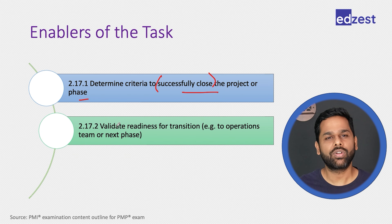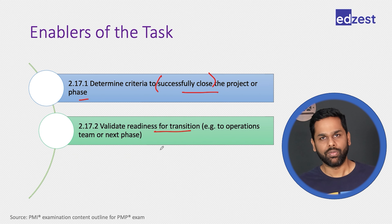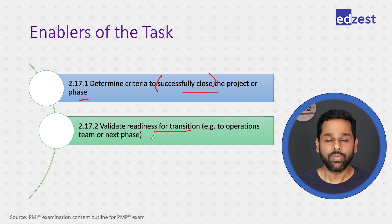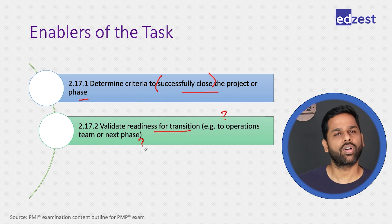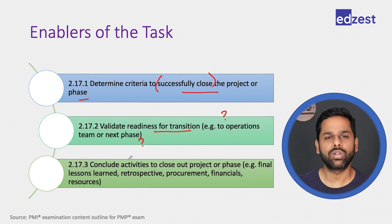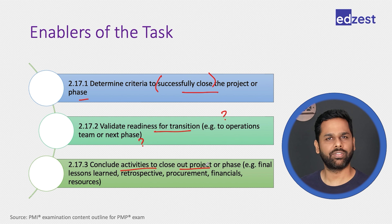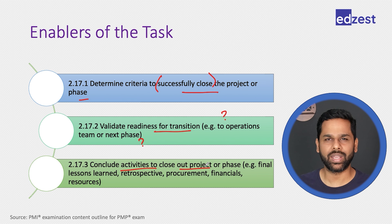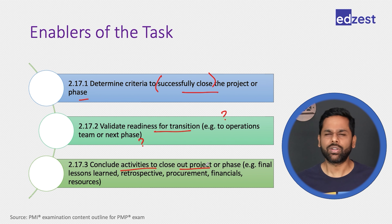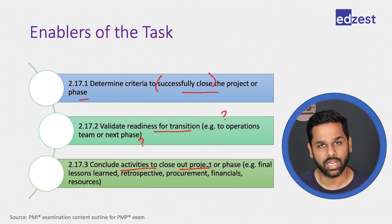The second enabler talks about validating the readiness for transition. We would be transitioning to a different phase, transitioning the product or services to the operations team. We need to validate whether the operations team is ready or not, whether our team is ready for the next phase. The third enabler talks about concluding the activities to close the project — final lessons learned, final retrospective, procurement closure, paying vendors, closing finances, submitting invoices to the customer.